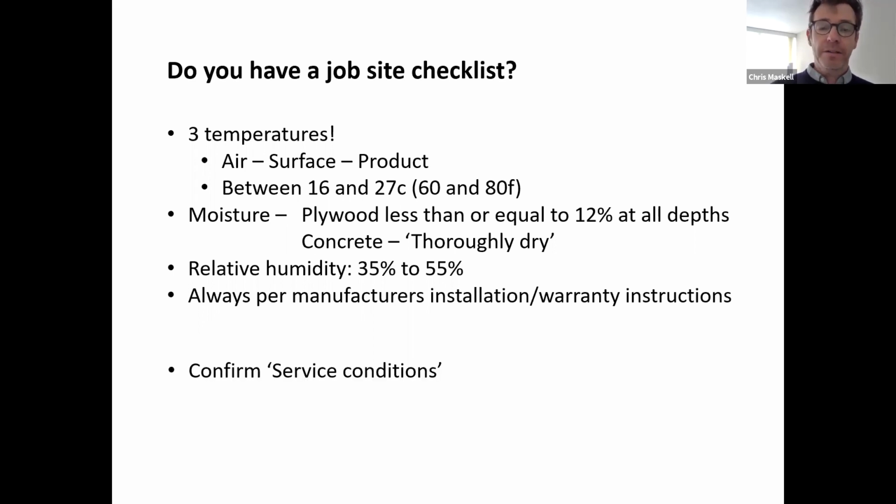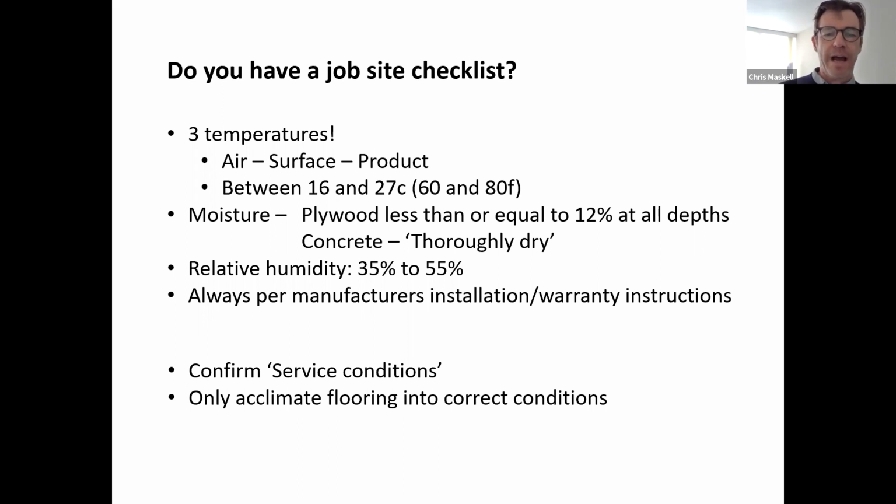And before you acclimate and deliver product to site, confirm service conditions. What we mean by service is occupancy. What would you like to move into for relative humidity and heat in your new home? Only acclimate flooring into correct conditions. I don't know how many times I've heard, yeah, don't worry, we acclimated the product, we sent it to site three months ago, and it's like, well, what were the site conditions? Huh? Well, does it matter? Yes, absolutely it matters.